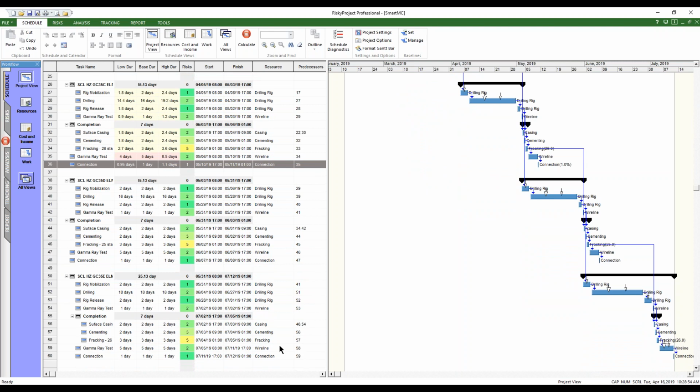That's because in schedule analysis we can improve a little, but a lot more can go wrong. So typically when we do a historical review of similar projects, the results are always on schedule or generally right skewed.